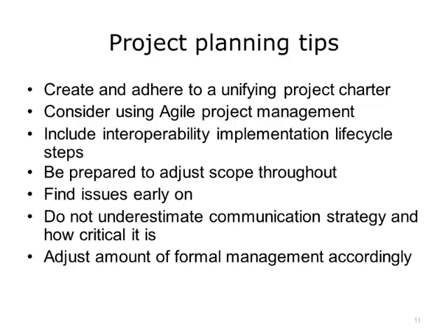The lifecycle steps should be included as tasks in the project plan because each one is important. By carefully following these steps, you can identify issues before the project is too far along. The less you have actually implemented, the cheaper it is to resolve or cancel.